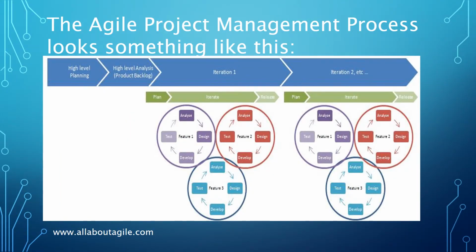In an agile setting, initial planning is kept to a minimum, just enough to outline the scope of the development project. Then the team will begin a series of iterations, analyzing, designing, developing, and testing each feature. Typically, an iteration lasts anywhere from 1 week to 30 days. Each feature is taken from start to finish within an iteration, and often, iterations are developed concurrently. This process makes it easier to find and correct problems quicker and at a lower cost.